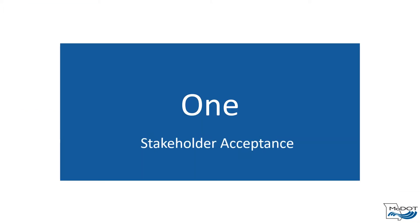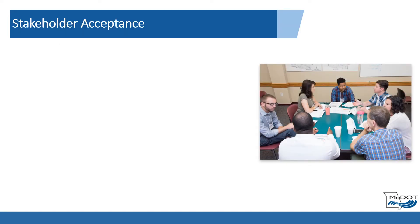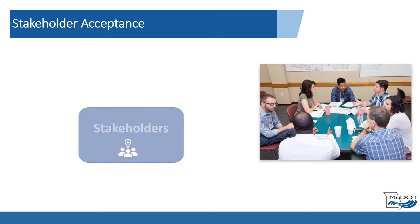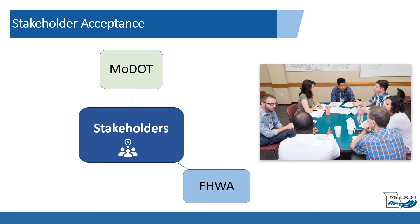Section 1 of the Methods and Assumptions report template is Stakeholder Acceptance. This section will document the project stakeholders that were consulted and made aware of the plan of work set forth in the Methods and Assumptions report for the project. Project stakeholders typically include a MoDOT representative, FHWA representative, and county or municipal representative. Stakeholders from other agencies and groups may be added as appropriate.